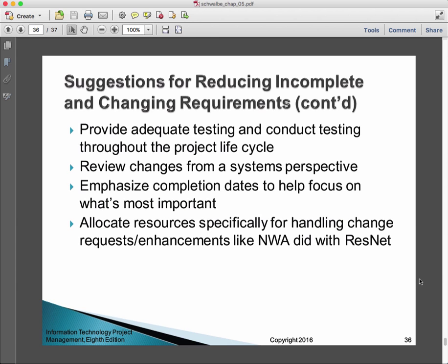They're not urgent enough. So they're going to go in a pile to be considered later, after this project. And then if we got through those two tests, then we'd say, oh, okay, let's do the analysis, let's do the planning, and let's talk about it in a week or two.